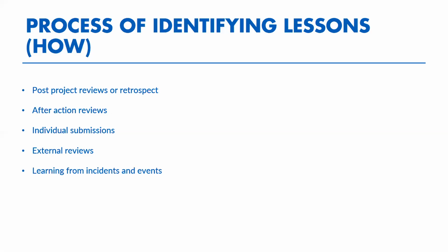This involves looking back at what has happened in the project and what has been achieved compared to your original objectives. So for example, you may look at what went wrong or what went right. And if you want to dig slightly deeper, you may also want to look at what were the causes behind things that went wrong, or what were the factors that contributed to the success of your project.